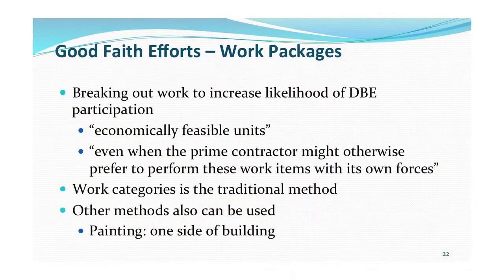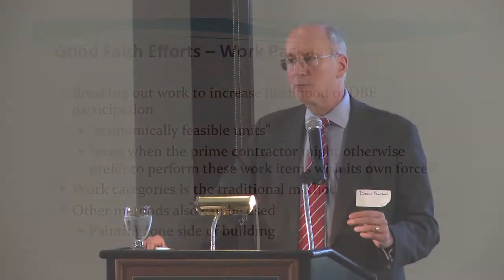So, you have to break the work out into economically feasible units. Oftentimes, my clients say, "Yeah, well, I did it for everything but my work, but I didn't want to do it to my work because that's what I was going to do." That's not enough. You have to even break out the work you intended to do and offer it to the DBE community.